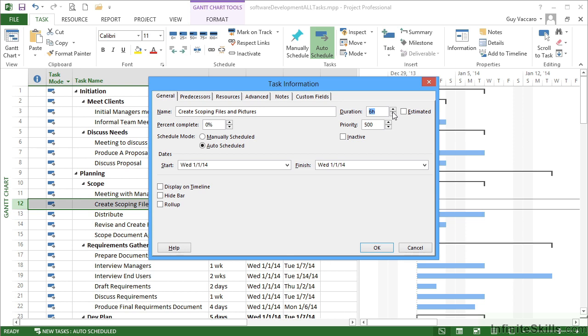Whilst I'm in here, I can also change this to an estimated task. All that effectively does is put the question mark at the end. And when it comes to project planning, every task is an estimation. So rather than scatter these question marks everywhere, I would personally suggest that an estimated task, where you flag it as an estimated task, is one that you need to go and do a little bit more research on to find out how much closer you can get to a real figure. So it's just a little flag.